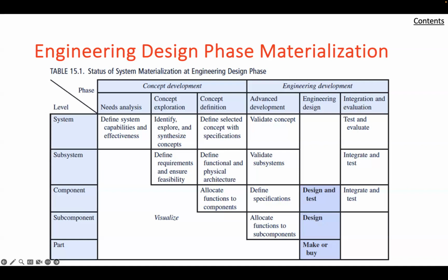However, by the end of the engineering design phase, such initial variation in component engineering status must be eliminated and all components fully materialized in terms of detailed hardware and software design and construction. A primary effort in this phase is the definition of the interfaces and interactions among internal components and with external entities. Experience has shown that aggressive technical leadership by system engineering is essential for the expeditious resolution of any interface incompatibilities which are brought to light during engineering design.